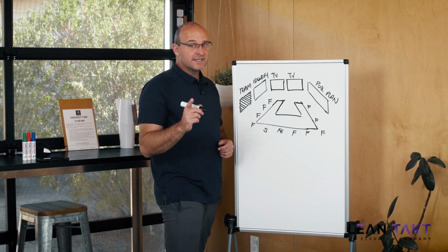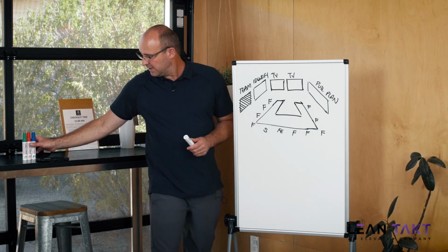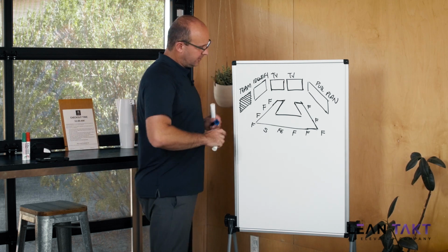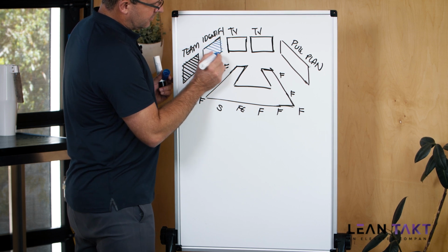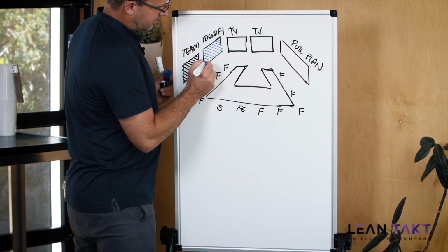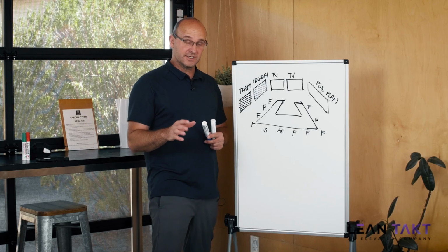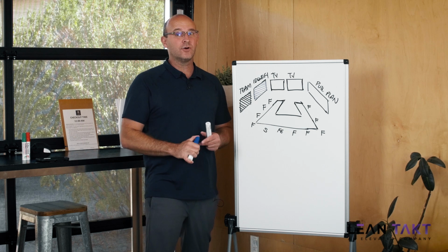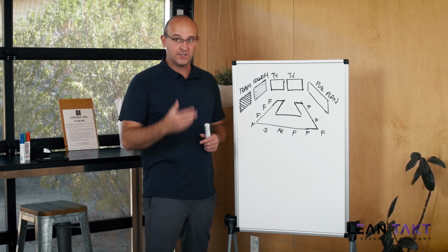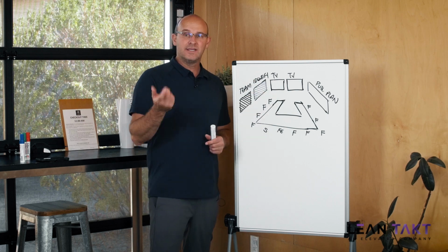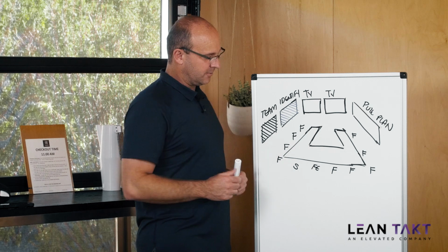Now, one of the things that I love about this is this identify board over here. In fact, I'm going to mark this blue because this is super huge. What I recommend having up on this board is the zone maps for the project, and that can be either 2D or an axonometric expanded view of the project, but you're going to show it with zones. And then your logistics plan, and then probably your delivery schedule right here on this board.